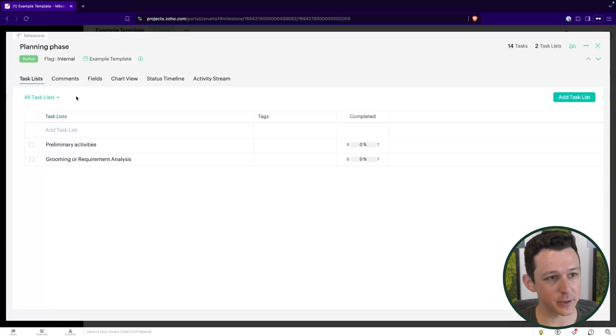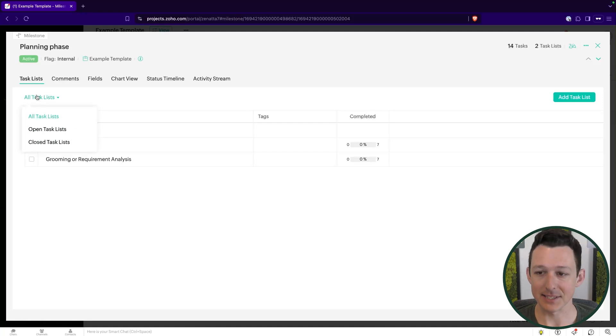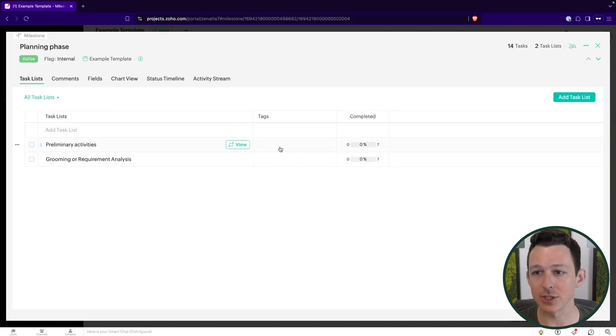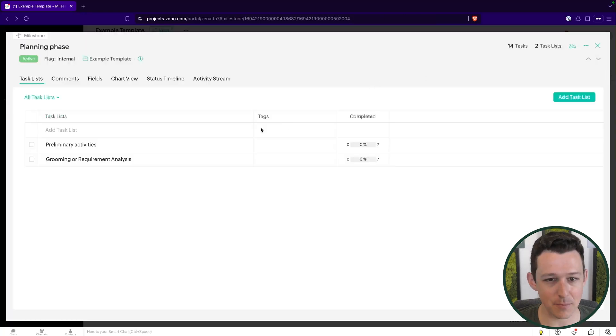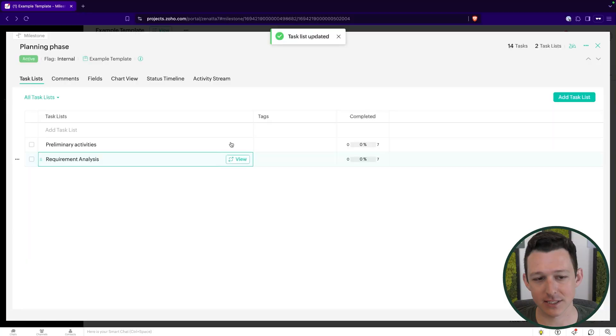Within each milestone we have task lists, which is the next object in our project template. A task list is simpler than a milestone — it doesn't have due dates or deadlines. It's really just a bucket that we're going to put some tasks in. Within the planning phase, for example, we're grouping tasks into preliminary activities and requirement analysis. Task lists don't get a start after or duration; they're really just an organizational tool.